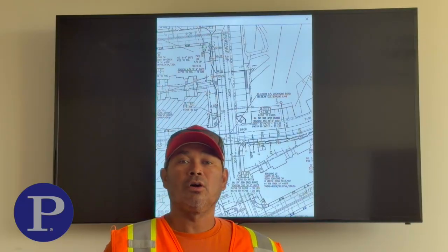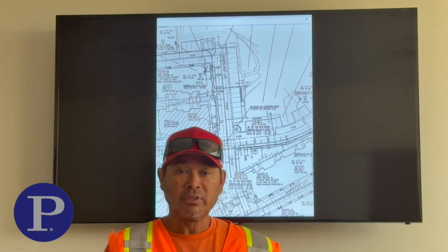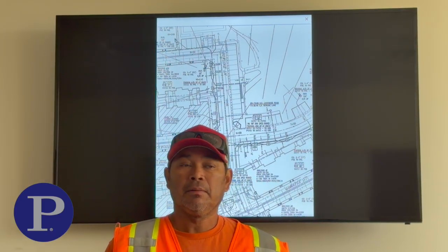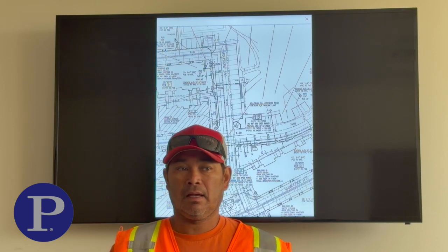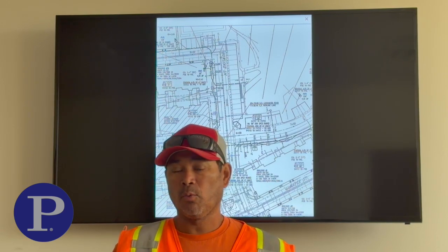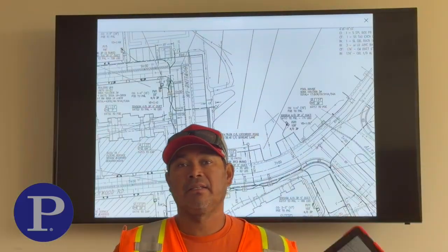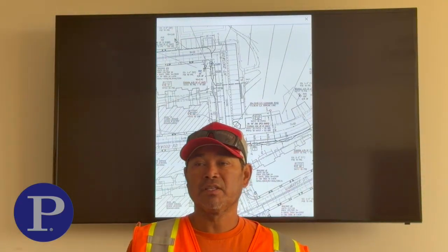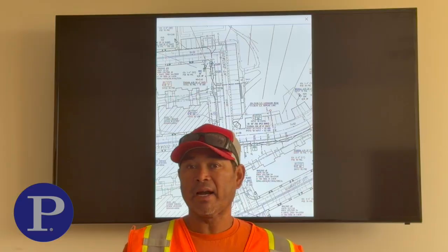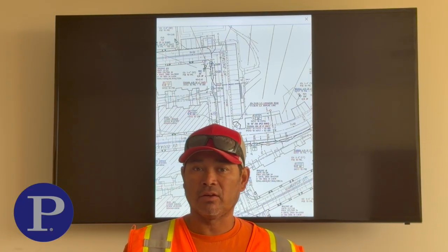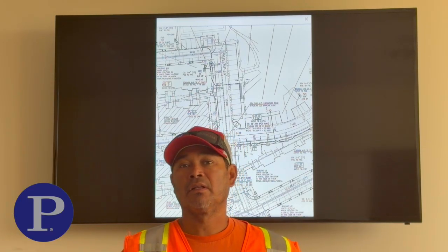Just to close on the multifamily, please speak with your inspectors when you need to add angles that are not on our designs, because many of the inspectors limit the amount of angles we can add on each run.